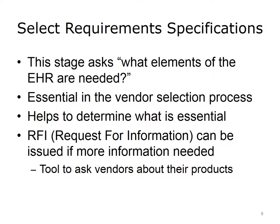Selecting the most able leaders will help the team achieve a successful implementation, even when challenges arise. Before an EHR system is selected, the appropriate specifications required for the organization must be determined. Determining what elements are and are not essential to the organization is also a fundamental step in the vendor selection process. An RFI is a document issued to vendors when more information is needed; it asks vendors for specific details about their products. Vendor responses to the RFIs allow organizations to build a knowledge base about the systems that will compete in the selection process.